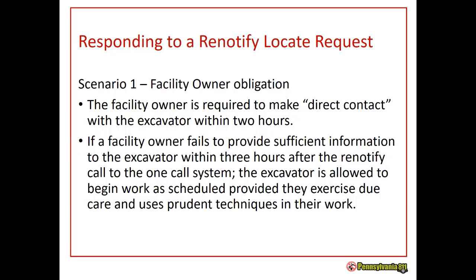Now, direct contact is a phone call, it's a Skype, FaceTime, it's a visit to the site. Direct contact is not a text message. Direct contact is not responding through the KARL system. Direct contact is not sending an email. So direct, you need to make one-on-one, like face-to-face or voice-to-voice contact with that excavator within 2 hours.